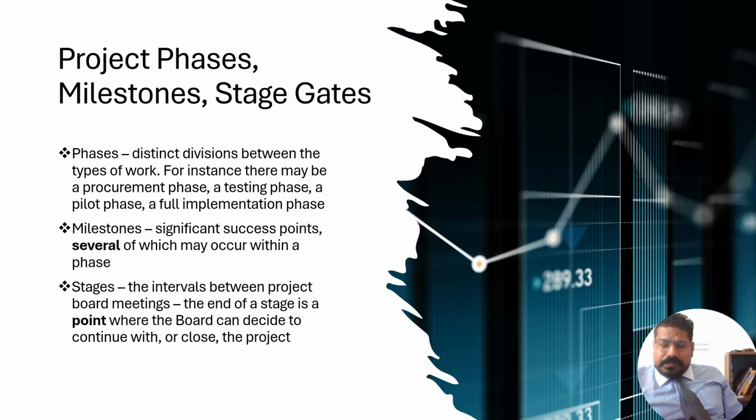Though due diligence has already been done, and a detailed study was done to understand the needs assessment and feasibility study, but let's say they somehow realize that the need was not captured correctly and they are already in the execution phase. At least they can save some money, or they can reinvent their product, or they can go back to the ideation phase to see if the actual need that they captured at the initiation phase is actually what is being satisfied.